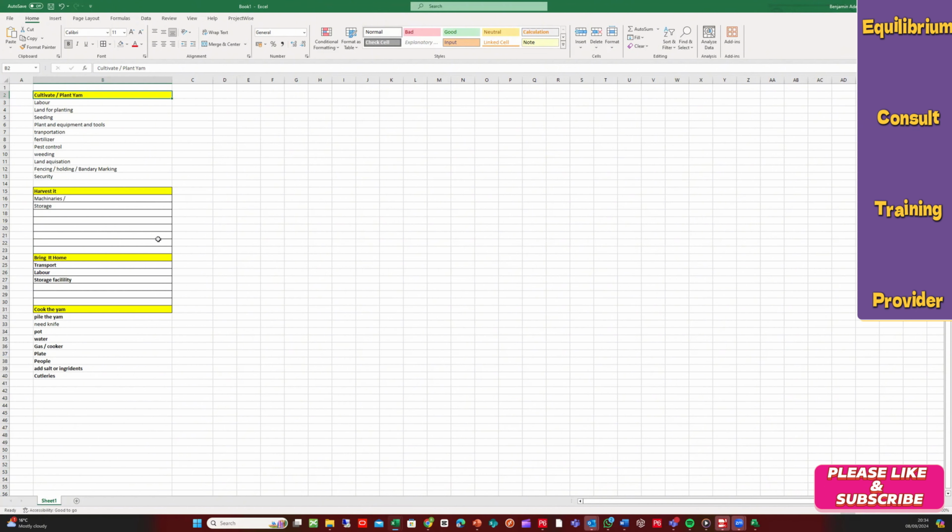However, from my experience, they do a very minimal job. At some point they will put you in a situation where you need to do something like this in some part of the work. They will just go on eye level, put something there to give you a clue of what they want to do, and just put the start and the finish of that thing. Every other thing that happens in between, they won't put it, because at the time they are doing the tender planner, they have limited information about the design. We're going to get into that as well: how design is done and the different stages.